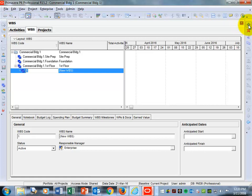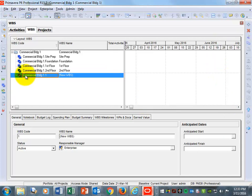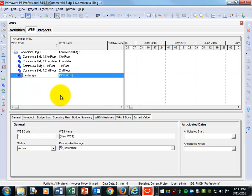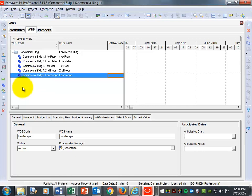Hit Plus again, use the blue arrow to bring it over, and type 'Second Floor' for both columns. Then add one more — use the blue arrow to move it out — and type 'Landscape.' That gives us all the WBS categories for this project. You'll also have a second project this week on a house, with different WBS like foundation, structural, interior, exterior finish, MEPs, and landscaping — maybe five or six WBS for that one as well.